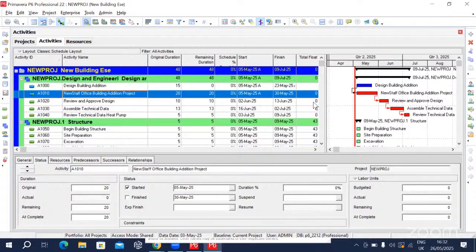Okay. So which means that activity is not critical because it started, but it's not finished. So you need to keep an eye on that activity because it's something that might affect you later on. As you're walking through it, you will find that anything that you link, as long as it's linked, as long as you started, it will turn blue. If you haven't started, it will remain as red.